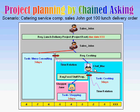Then Chef Mac accepted this request and created his cooking task with three days' duration, and issued a food staff shopping request to Shopper Jen, setting a time relation from the shopping request to the cooking task. Finally, Shopper Jen accepted this request and created her shopping task. By this way, we can develop a whole work plan and schedule by chained asking procedures.